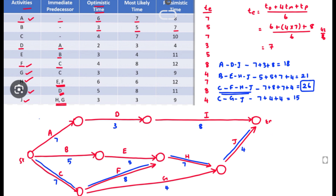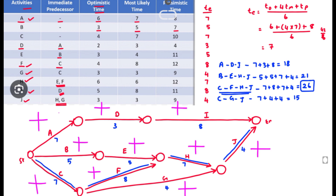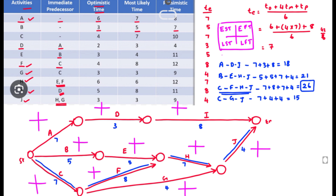Now we can find EST, EFT, LST, and LFT. We put a plus mark over all activities — top is EST, here is EFT, here is LST, and here is LFT. The rule is: going in the forward direction we take the maximum duration; going in the backward direction we take the minimum. Activities with no predecessor start at 0.